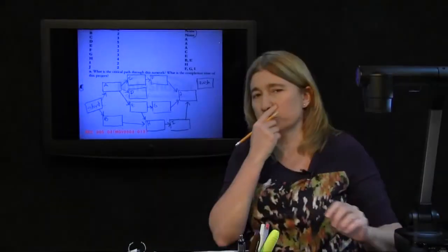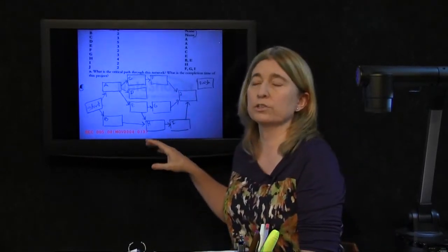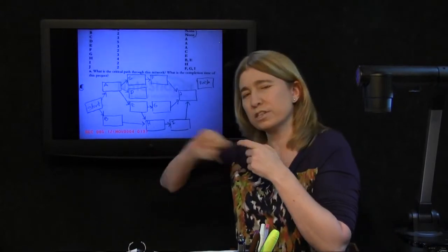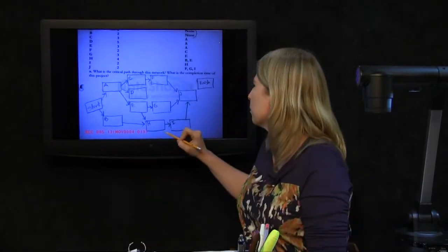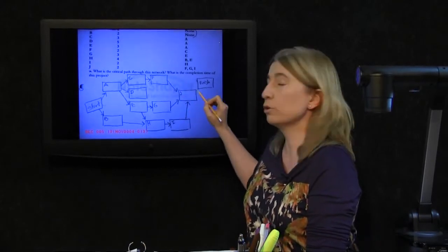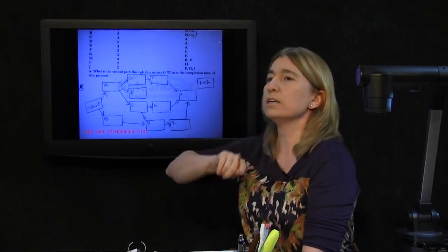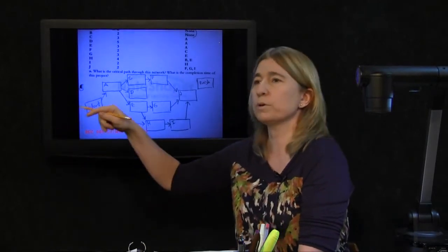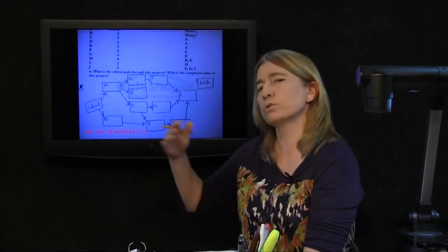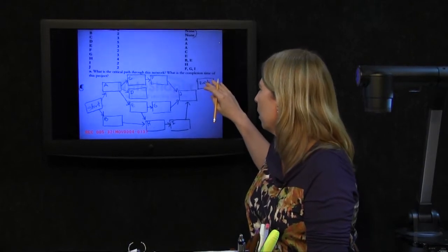Now what I want to do is I want to connect every task in my sketch that has arrows pointing at it, but right now there's no way to escape it, so to speak. So for instance, you notice that J is that way. There's arrows pointing in, but there's no way right now to get out, so to speak. That means that it is connected to the finish. It must be like one of those last things that's done just before the finish. There's no tasks after it. Okay, so J needs to be connected, not a problem.